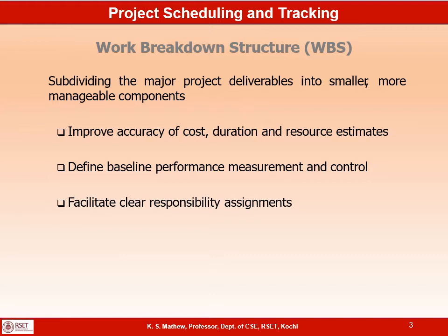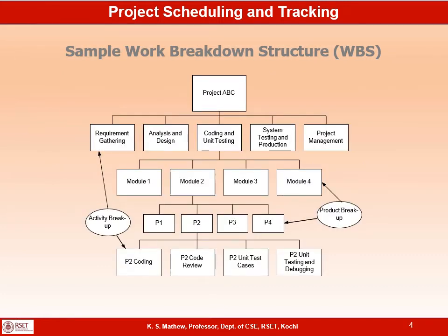Third reason why we need a work breakdown structure is to facilitate clear responsibility assignments. As I said, if it is a big module, assigning responsibility for that big module to an individual or a group of individuals may not be very easy, and monitoring the progress will also be difficult. But if you divide a big deliverable into small sub deliverables, responsibility can be easily assigned to a few individual people, and this WBS becomes the basic input for preparing a schedule.